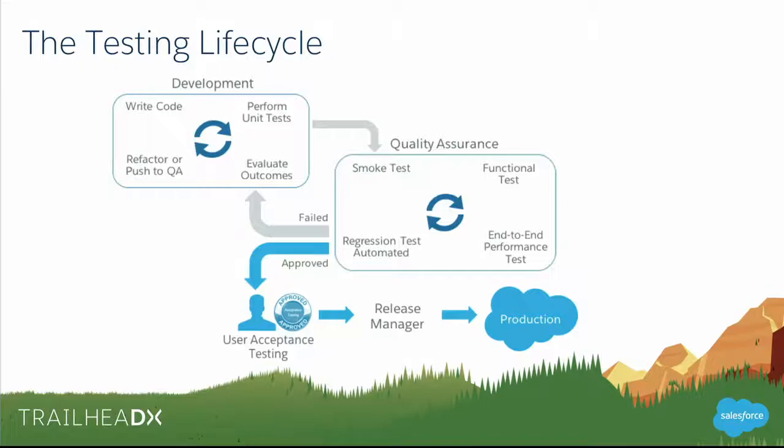So, in addition to what's seen here, a lot of dedicated agile shops, agile with a capital A, agile with a lowercase a, different organizations to different degrees, they'll often include a feature validation step that's maybe not depicted here. So, for each kind of granular request, requirement, line item in a business backlog that's part of a sprint, we'll go through a feature validation of that construction in isolation prior to merging feature branches and doing deployments. And again, that's another thing that DX really attempts to tackle more holistically, right?